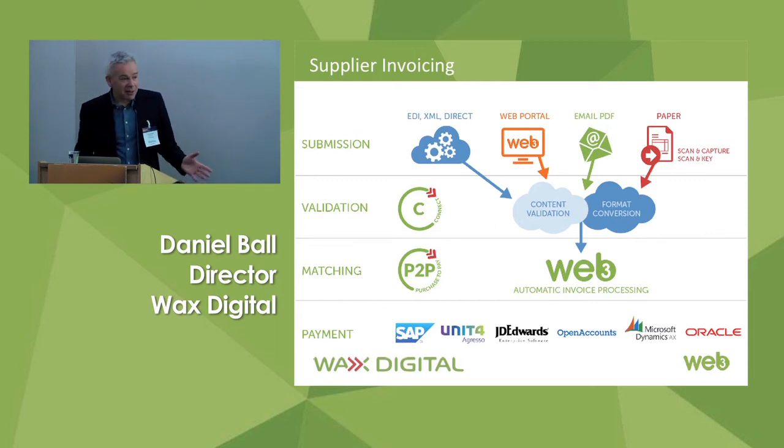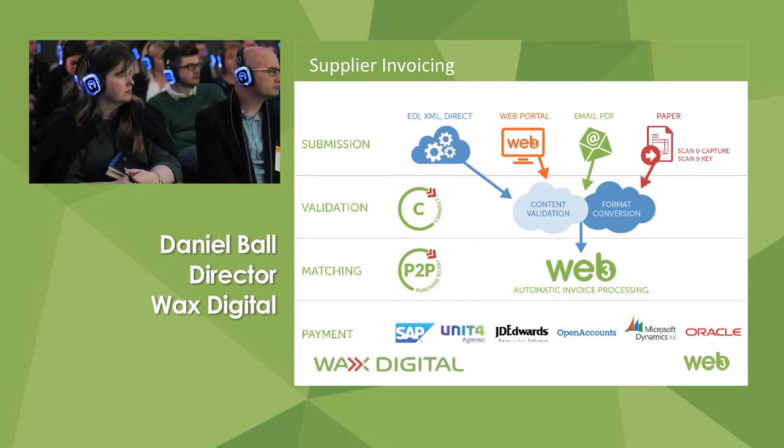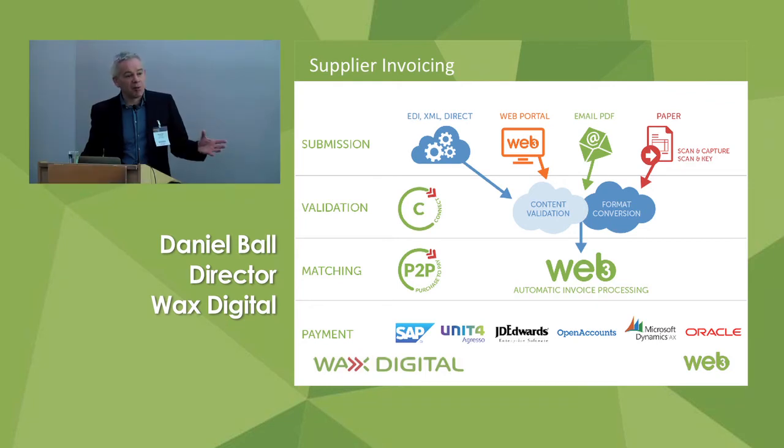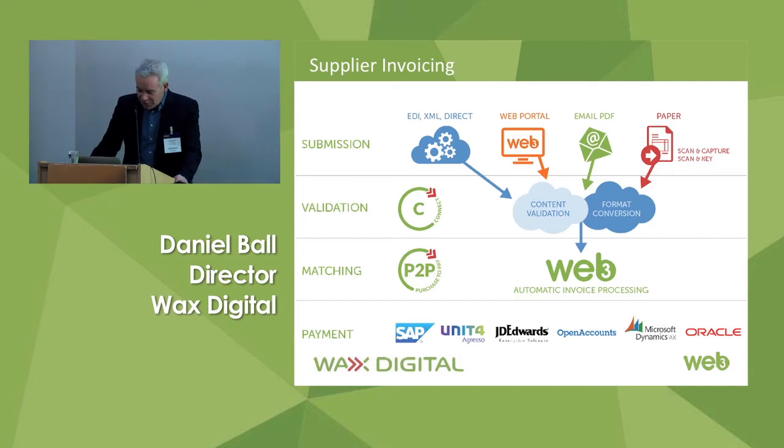Now, the only downside to that is that there is a cost per invoice involved in that process. And that cost disappears when you migrate suppliers over to using a supplier portal. At least it does in our particular case. There are obviously vendors that charge suppliers for that. But that is something you can do over time. It's not something that you have to force on day one. There are a lot of other priorities as you're taking a system live that are perhaps more important to you, and it's not necessarily good to add that pressure point at that particular time.